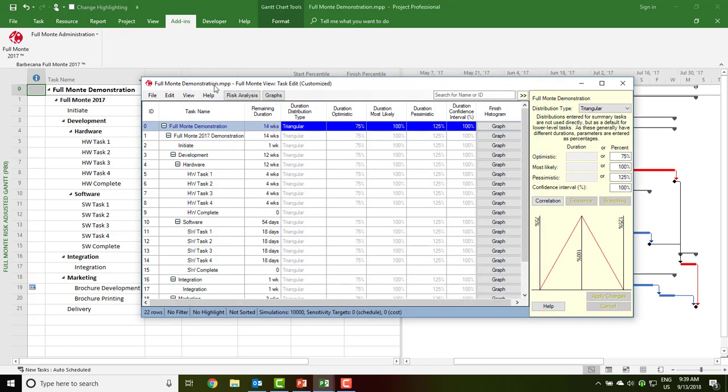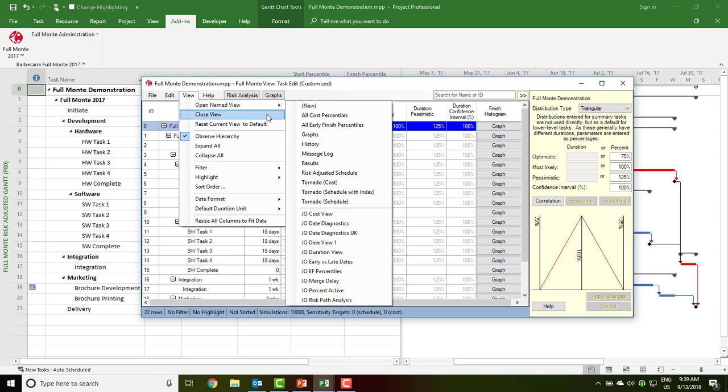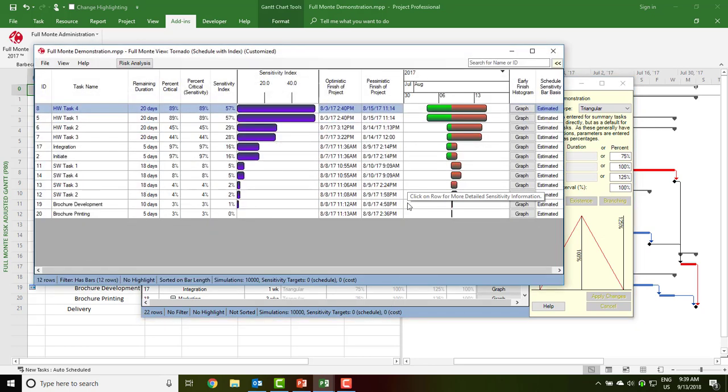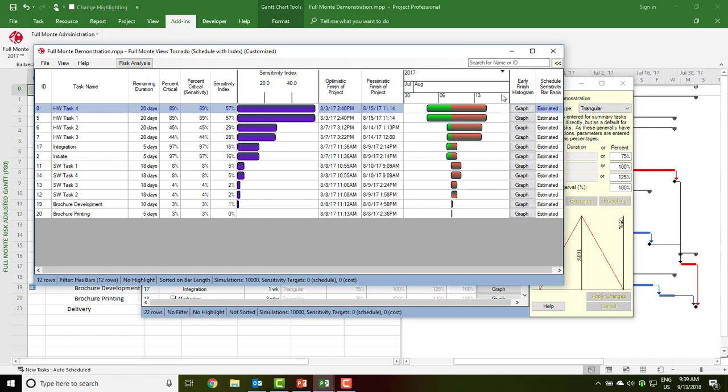We can also view a tornado chart to see which tasks are creating the most uncertainty in the outcome, and also where the green bars present opportunities for schedule compression.